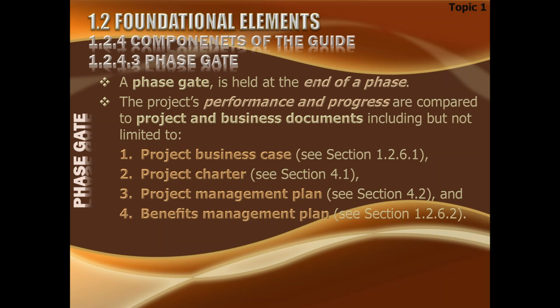So when the project is initiated, the charter is to be developed. The charter is the legal official permission to start the project, and that is normally given by the project sponsor to the project manager. But the project manager can also contribute towards the charter, but naturally he is not the author of it. Once the project manager takes on the project, his job is to develop a project management plan. The project management plan deals with the work of the project, how and when and where it will be done. But once the project delivers its deliverable, the project management plan's work is done.